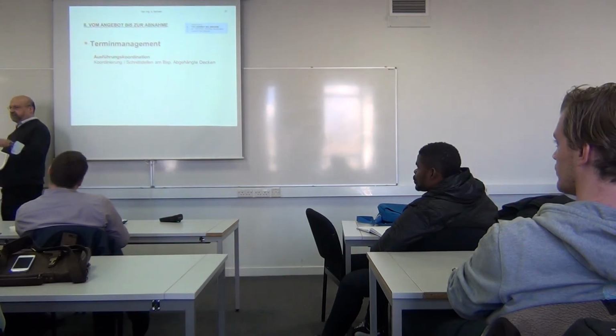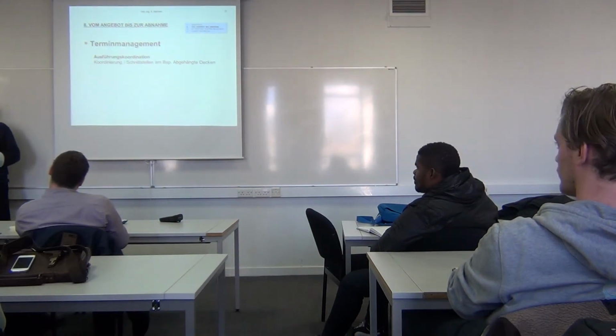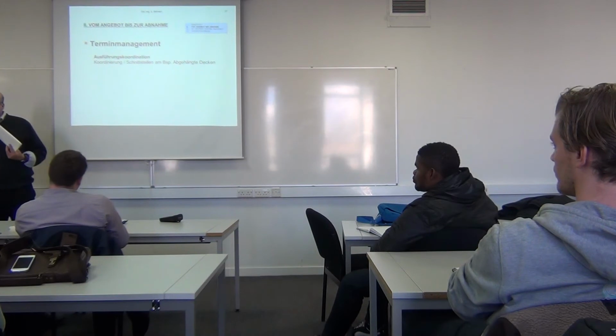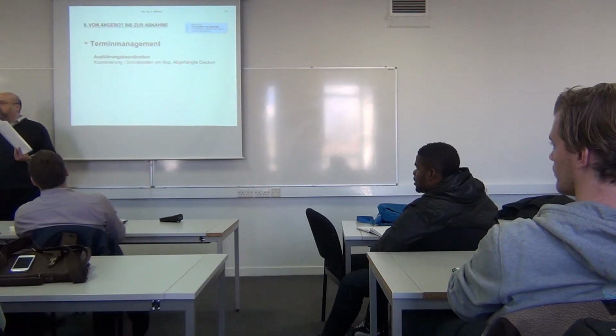Yeah. The contract is mainly three things, or four things. One thing is what is the price for which works. Second, what is the time given for these works. And the third thing is what are the conditions of work. For example, can the subcontractor use a crane or so?